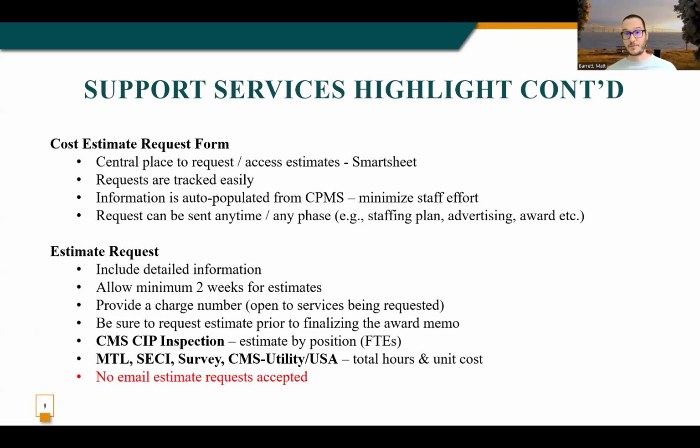When you're submitting your request, as you'll see in our demonstration in a few minutes, a lot of the information is automatically populated from CPMS into your request forms to minimize the extra typing you have to do. Requests can be sent at any time and during any phase of your project. A lot of these projects are going to be very preliminary when you're submitting cost estimate requests for staff planning purposes. You might only have a budget and a rough program for what the project is going to consist of, and we can provide a high-level program level estimate at that point. But the more detailed information you can provide, the more accurate and more refined our estimate can be.